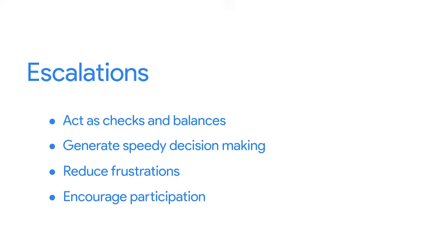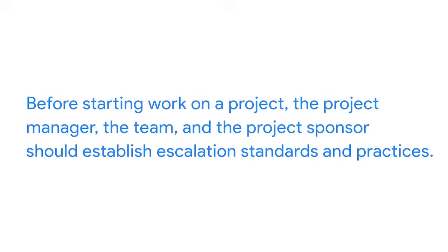Finally, escalations encourage participation. Encouraging others to participate in solving or owning problems can promote trust and shared responsibility among teammates, which are signs of a healthy, functional team. Before starting work on a project, the project manager, the team, and the project sponsor should establish escalation standards and practices. This means they'll specify who the issues will be raised to, how issues are raised, and the forum for discussion. A little upfront work will help escalations run smoothly, when and if they are needed.